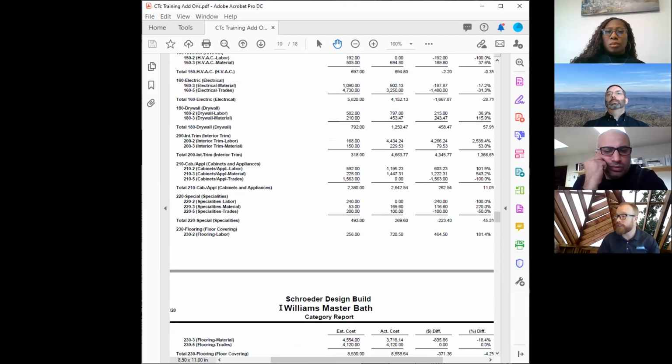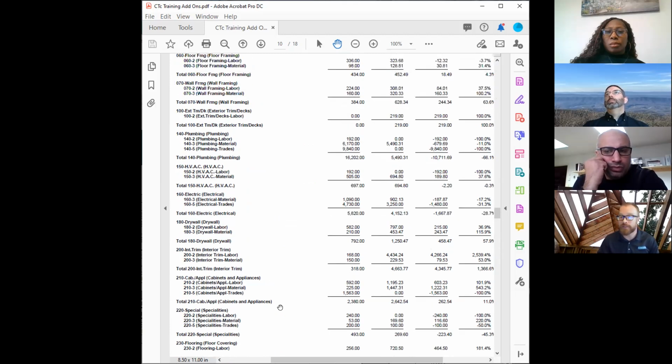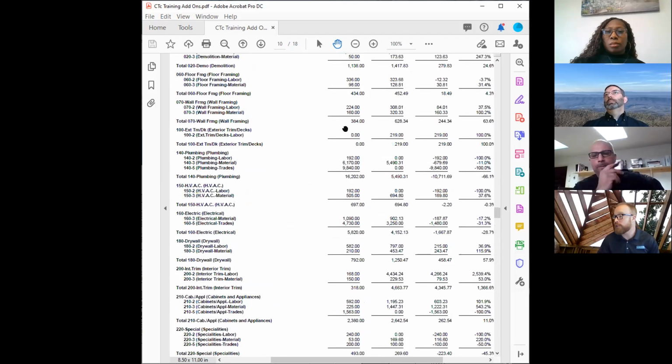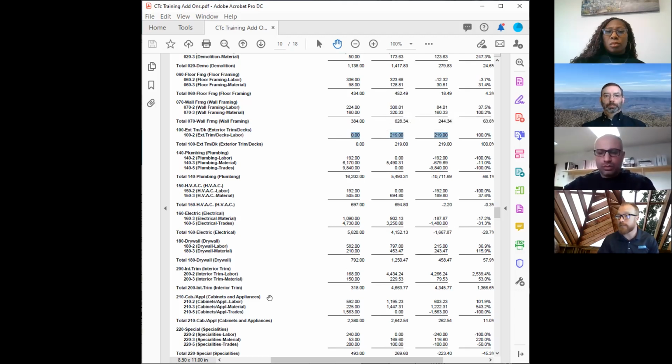So I would just circle it, because I'm trying to figure out, is that a miscode, or do you want to talk to your carpenters and say, why did you need to insulate for 3 hours? Like, what was the rationale behind that? And you can get feedback. Maybe it was an error that the insulators missed something. Maybe we need to go back and get a credit back from the insulator because of that. Or we had to go above and beyond because we didn't know something took place. But it's helpful to know that in the assessment of how we're building the project.